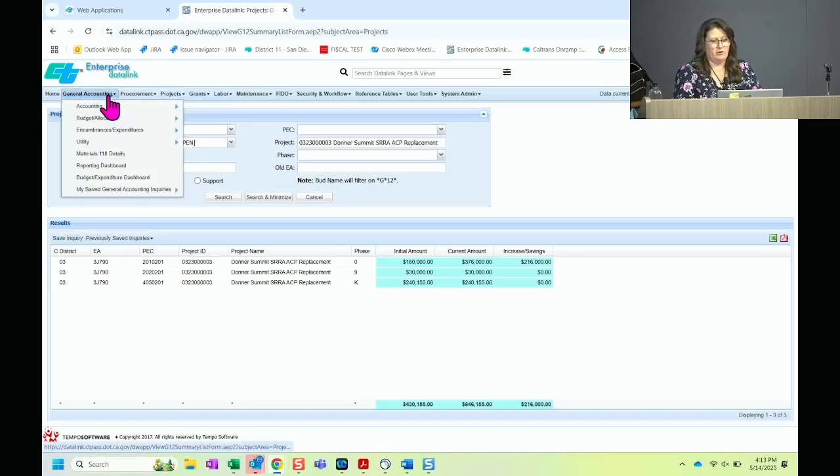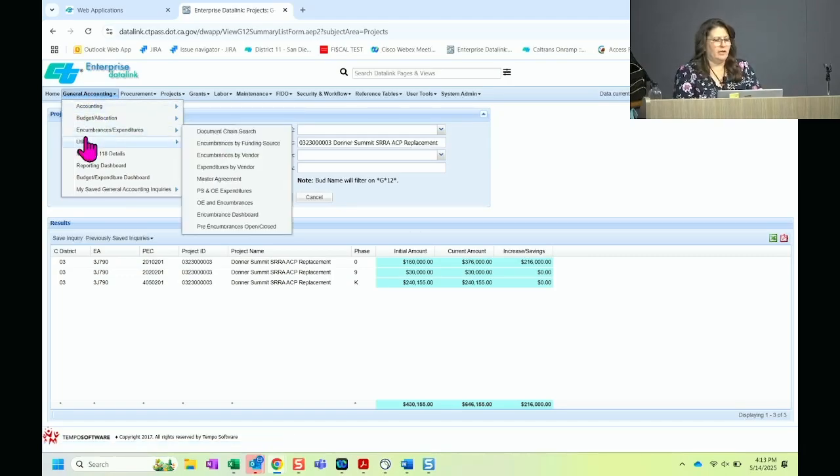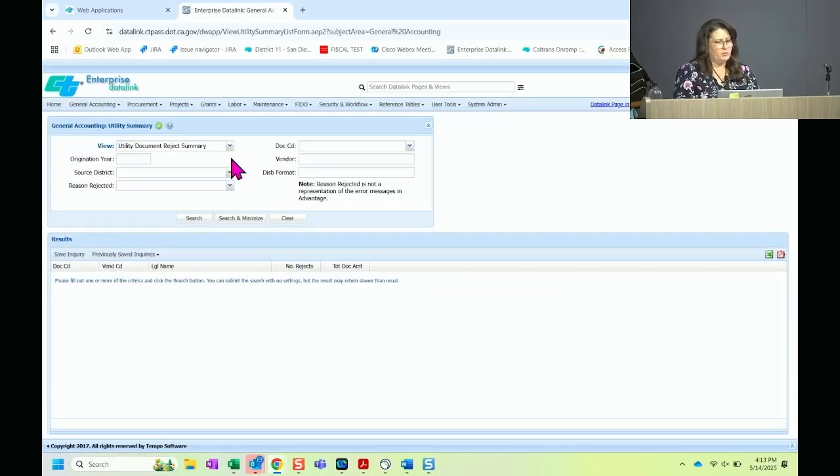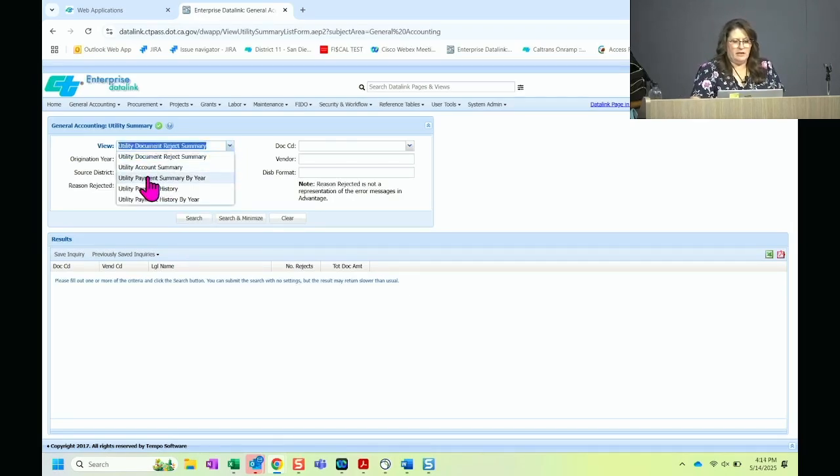No? Okay. All right, utilities. Prior to going to project control and shutting down your project, it's critical that you check your utilities. Under the general accounting utilities page, there's a view, go ahead and go there, called utility summary. You guys are getting bonus things today. And then I'm going to switch over to encumbrances after this. There's a view in here called utility account summary.